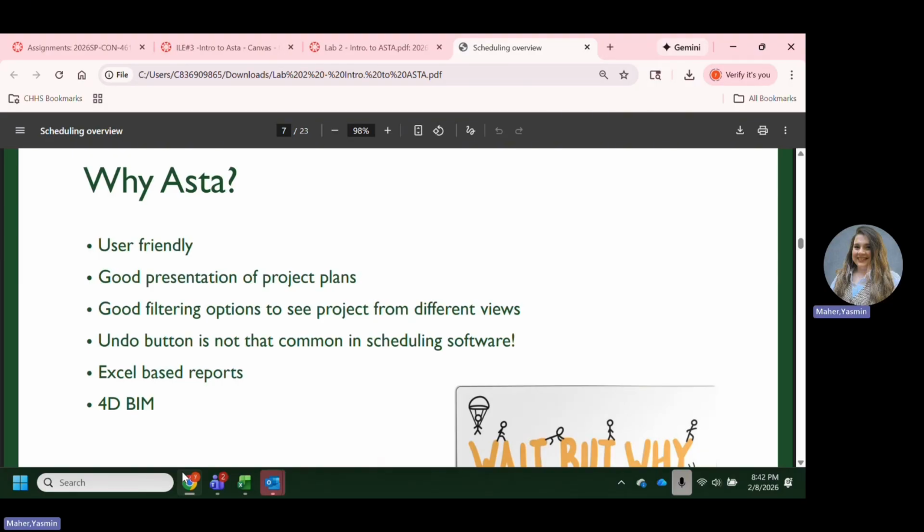You need to add all the activities, you need to add the durations, you need to add the logic between the tasks. Okay? So if you entered any of this information wrong, you didn't enter the correct durations, you didn't enter the correct logic, sequence, links, then you get a wrong finish date. You get a wrong schedule. So garbage in is garbage out.